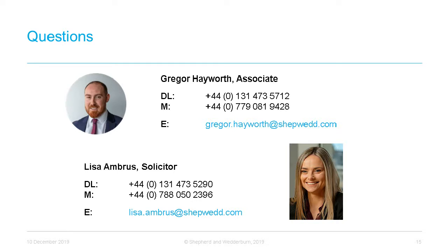Okay, so yeah, the leading case in Scotland on concurrent delay would be the City Inn against Shepherd Construction case, and that case was an Inner House decision of the Court of Session. That case isn't binding on English courts, although decisions of the Inner House can be persuasive.